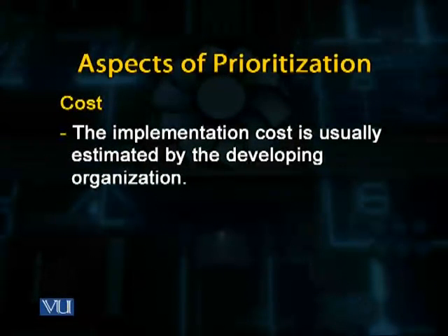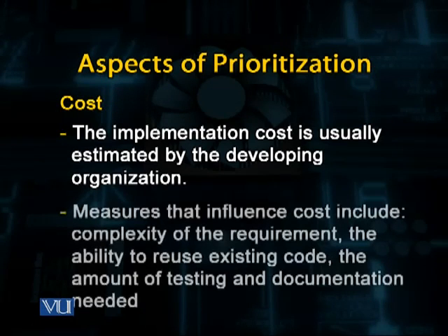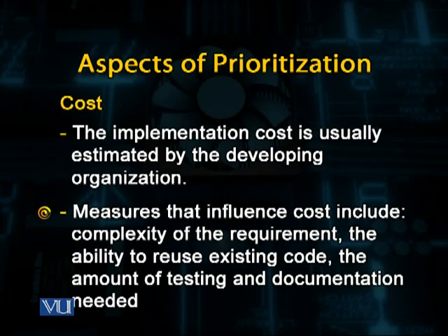ایک ایسپیکٹ ہے کاسٹ کا۔ This is a very important aspect. The implementation cost is usually estimated by the developing organization. Measures that influence the cost include complexity of the requirement, the ability to reuse existing code, the amount of testing and documentation required. And cost is often expressed in terms of staff hours.